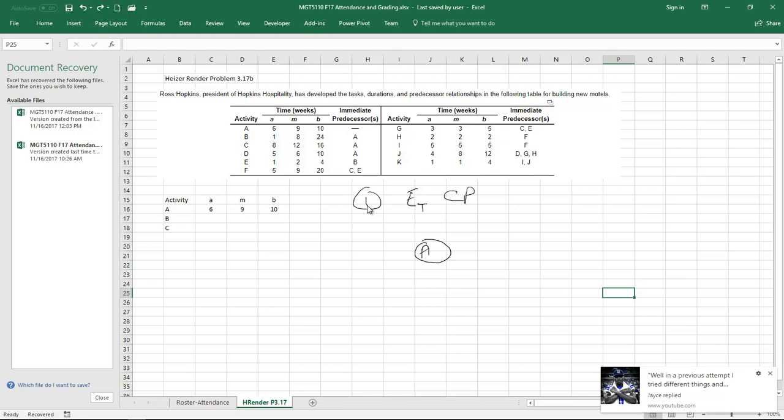When you look at that, 9 is not centered between 6 and 10. If it were 8, we would be 2 away from 6, we would be 2 away from 10, and this would be centrally located. What we know is that 9 is closer to 10 here. So this data is not centered around 9, and we can guess that we're going to pull the time. It's more likely that it's going to be less time than it is going to be more time. Just by inspecting this, the nature of numbers, and when we're doing an average.